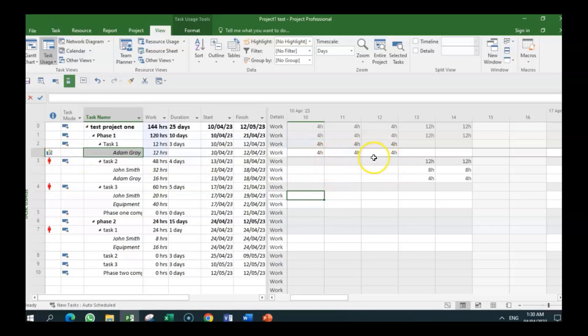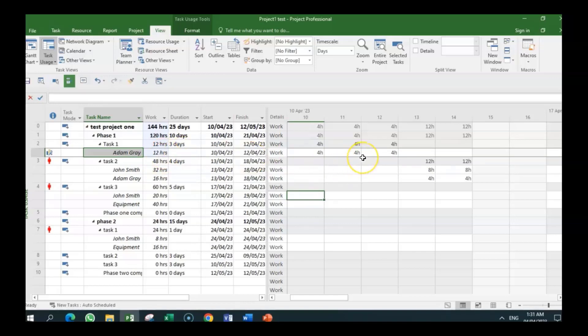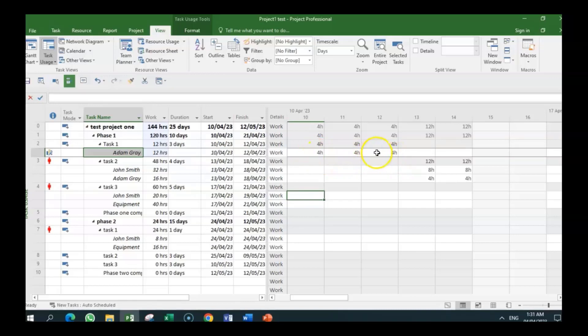Now when you change it here, you have to now look at the impact, because he was supposed to work 24 hours—eight by three—and now he's working 12. It means that we have to make sure we have adjusted it here, but we have to do something else. We may have to—okay, HR is saying we cannot get additional staff. We may have to see, for instance, is there anyone in the group that can fill that gap? Because we have fixed this, but we haven't fixed the issue. The issue is this task needs 24 hours.